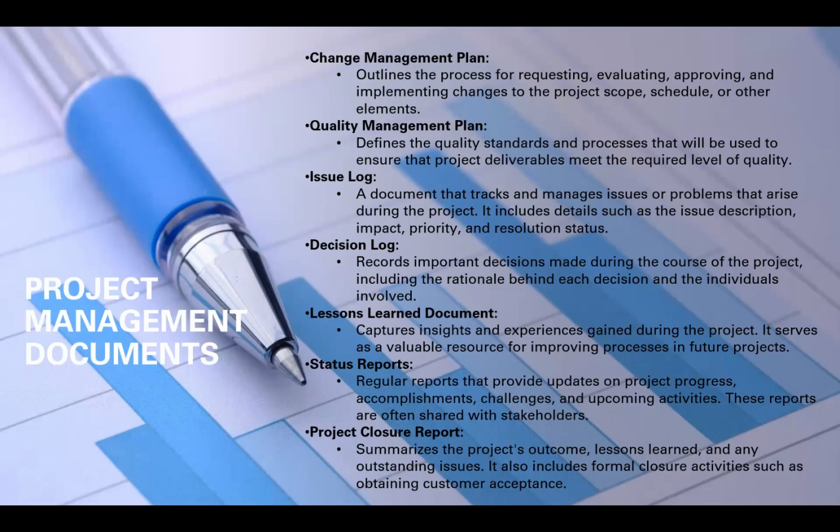Actually, we have what we call the RAID log, that is the risk, action, issues, and dependency log. This log must be handy for the project manager or the project support officer. Then lessons learned. As the project is going, you're going to learn a lot of lessons. You document those lessons for future references.